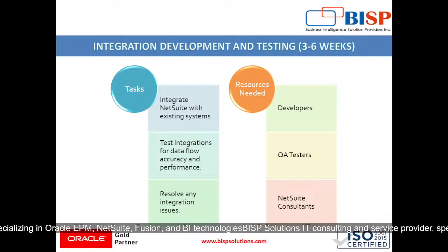Then integration development and testing will take around 3 to 6 weeks. The tasks involved are integrating NetSuite with existing systems, testing integrations for data flow, accuracy and performance, and resolving any integration issues if there are any. Resources needed are developers, QA testers and NetSuite consultants.